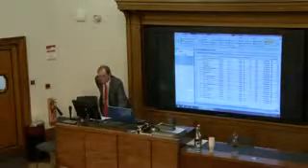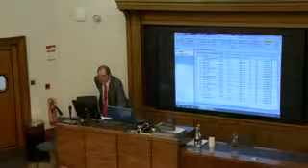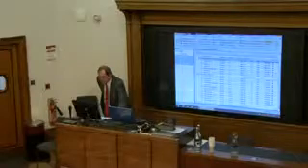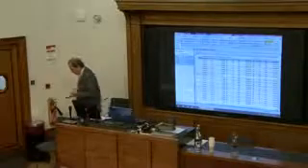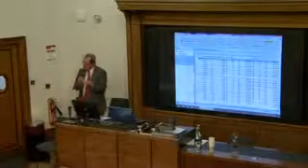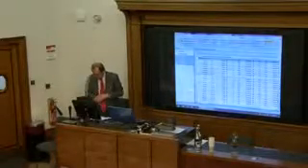I can look at total costs. Any one of these fields across the top, I can select total costs, and it will look at the total costs across the project. I can group by any field, and as it's a Microsoft Project, I only want to look at normal activities, and it goes through each of these activities, and I can see where the total costs have gone up, gone down, so I can spot immediately where my problems are.